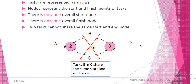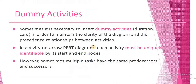These are the very basic characteristics of activity on arrow diagrams, and this will be needed to understand why we will use the dummy activity. Now let's take a look at the definition of dummy activities. What is a dummy activity? Sometimes it is necessary to insert dummy activities whose duration is 0 in order to maintain the clarity of the diagram.